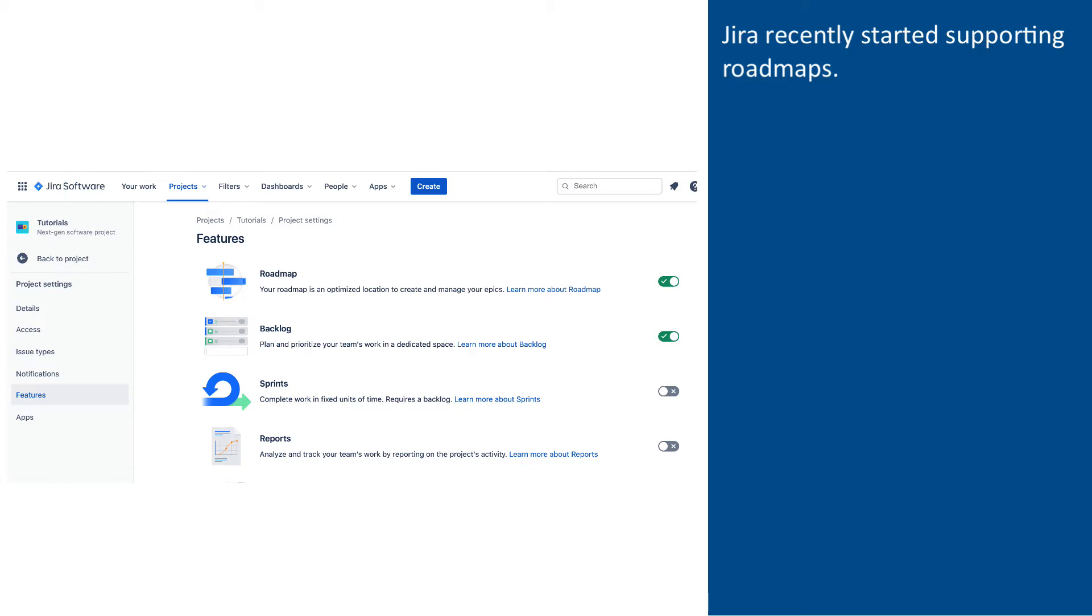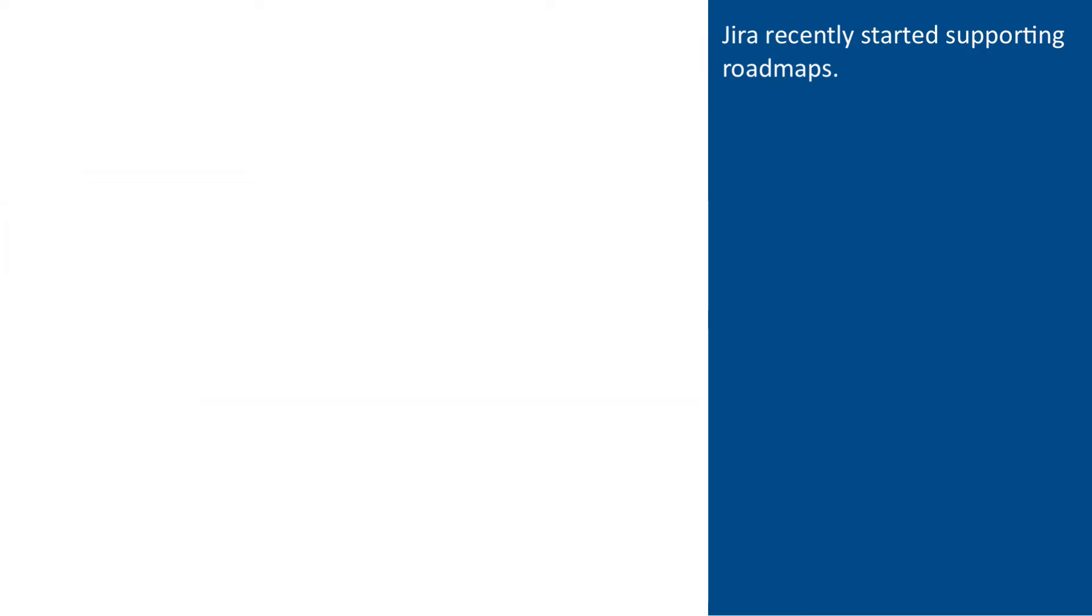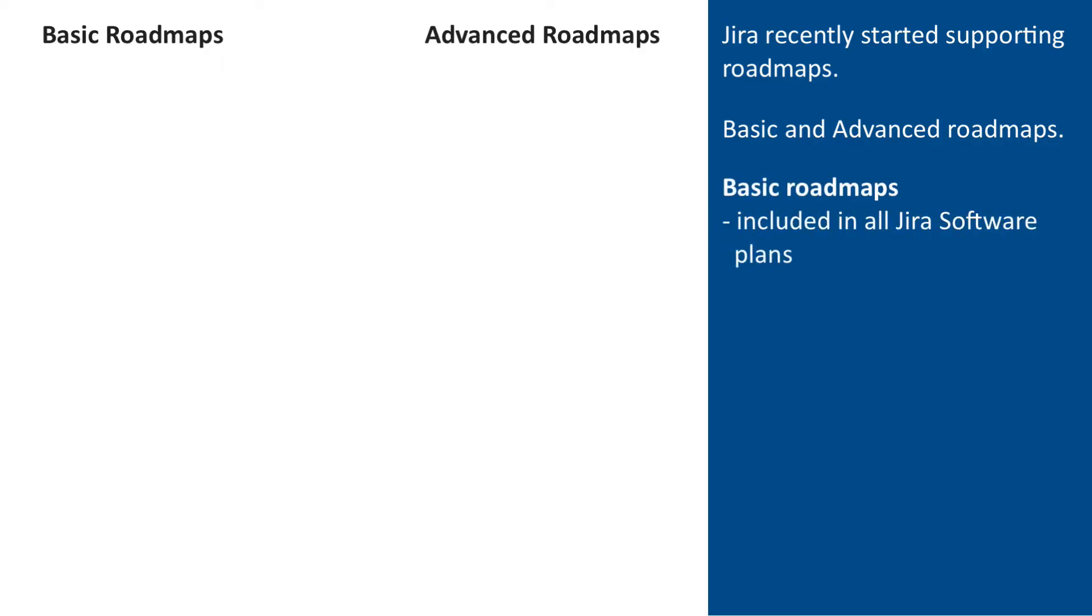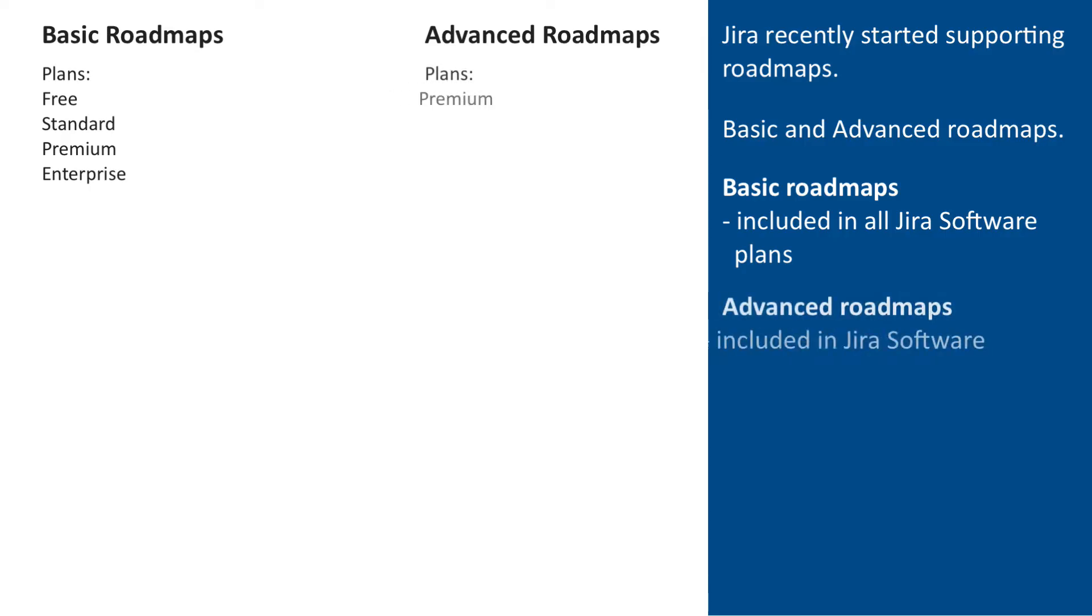Jira was not supporting the concept of roadmaps until recently. This feature was first rolled out exclusively in the next-gen projects and later in the classic projects. Jira roadmaps come in two flavors, basic and advanced. Basic roadmaps are available as a part of all Jira software plans, including the free one, while advanced roadmaps are included in Jira software premium plans.